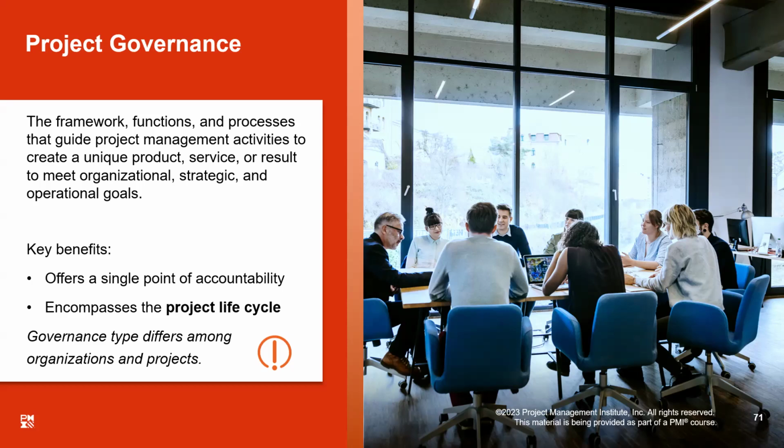It could be the sponsor, it could be the program manager, it could be the portfolio manager, or anyone under whomsoever you come in the chain of command, that person is supposed to provide you project governance. And abiding by that governance, you will create your project management plan because you are a project manager.